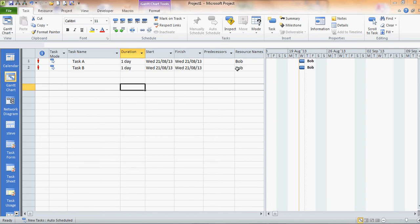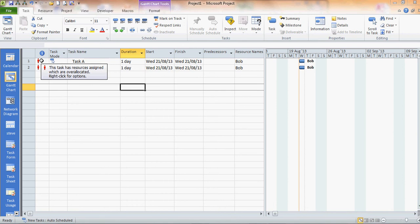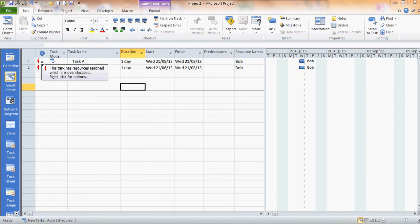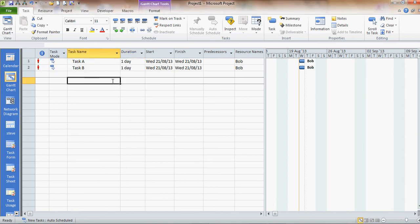I've assigned Bob to both tasks. They're both going on at the same time. So in the information column I've got a little red man indication telling me that Bob is over allocated. I know that but I now need to rectify that.